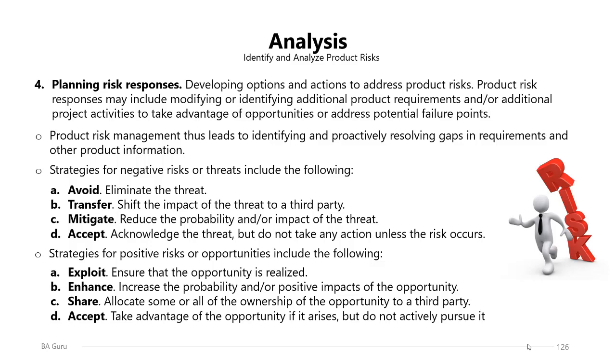Sharing means allocating some or all of the ownership of the opportunity to a third party, like making a partnership or a joint venture with another firm in order to gain an opportunity. And acceptance is taking advantage of the opportunity if it arises, but do not actively pursue it.